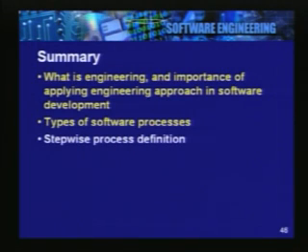We defined a stepwise process definition where the software methodology consists of multiple steps. We made a very rigorous definition of what we mean by a software development step. It has entry criteria, exit criteria, something specific to be done, some techniques to be employed, some documentation or some other output to be produced, which will be used by subsequent steps. So, the essence of the engineering approach is to define a stepwise methodology for carrying out the project.